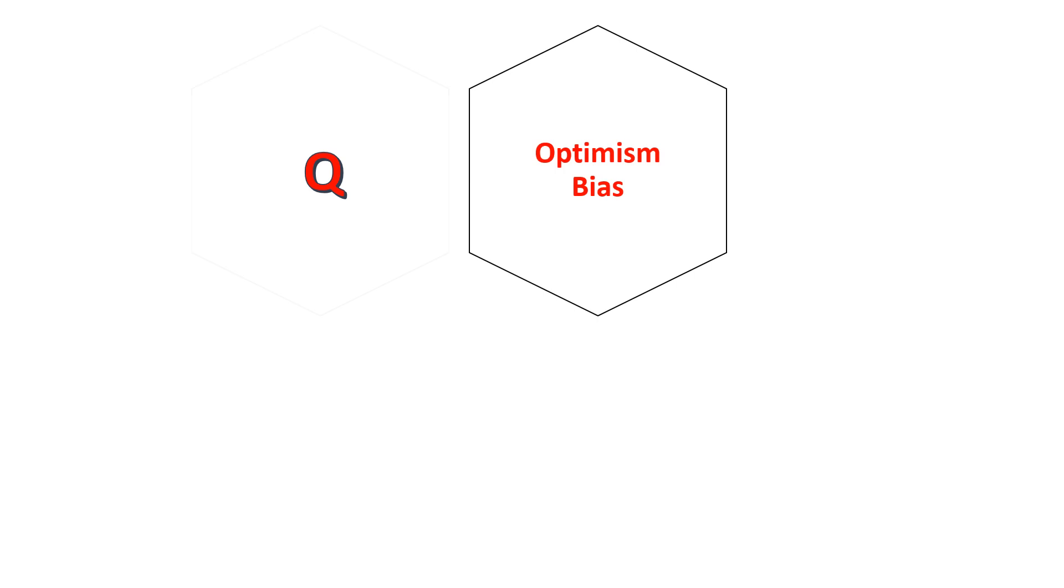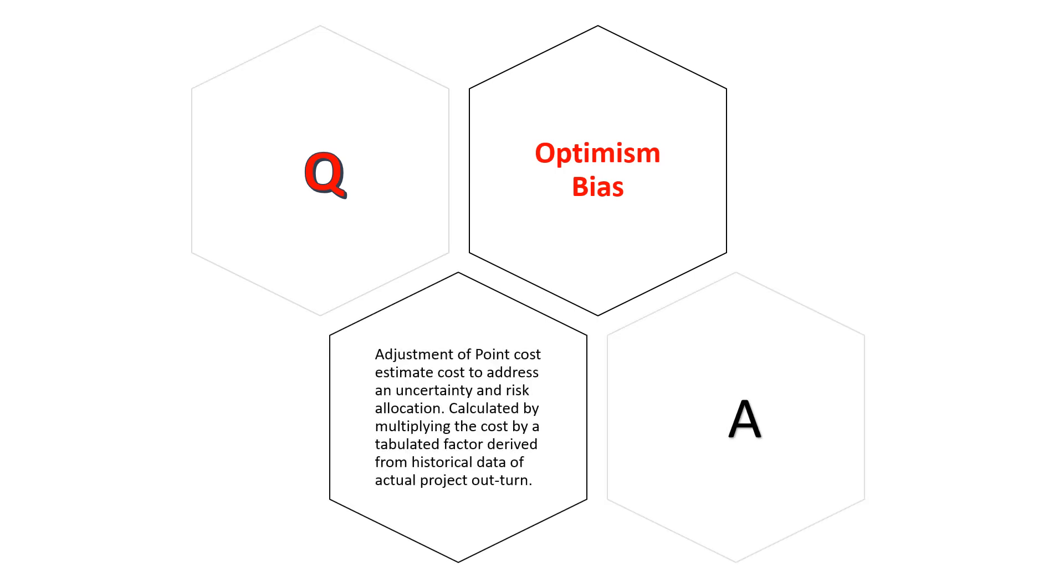Optimism bias: Adjustment of point cost estimate to address uncertainty and risk allocation. Calculated by multiplying the cost by a tabulated factor derived from historical data of actual project outturn.